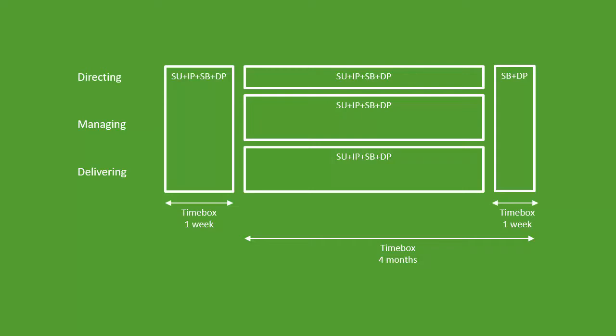And then at the end of that time box, because this is going to be done on a time box, maybe you use 1 week for this at the end of the stage. At the end of that time box, the product board is going to make a decision. Do we want to keep funding this project? And if the decision is yes, you're moving on to the next stage, which is just like the stage you just finished, and it's all working on a cadence. So you're doing it again and again and again.